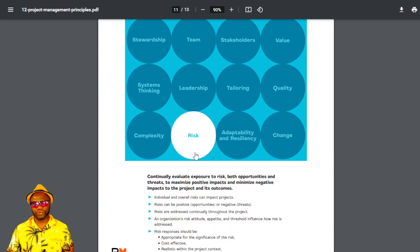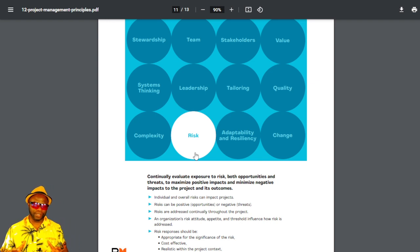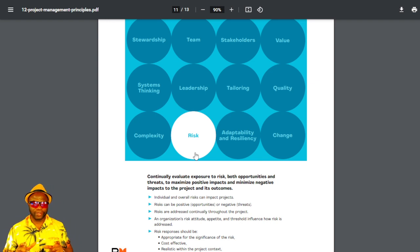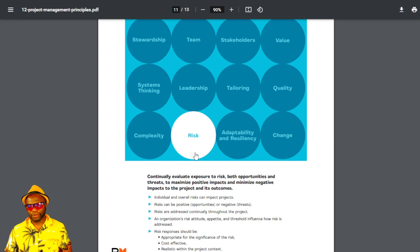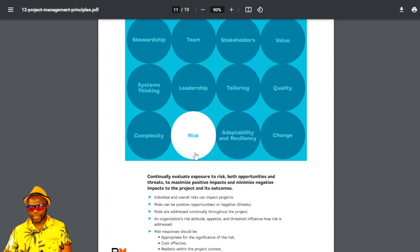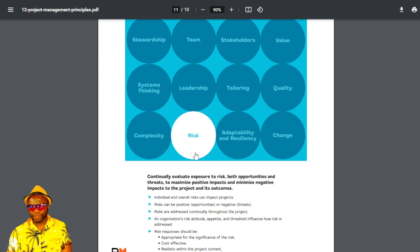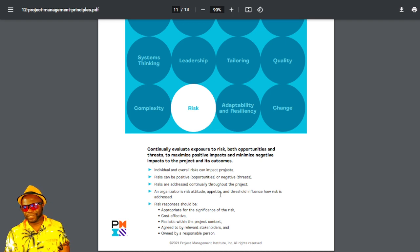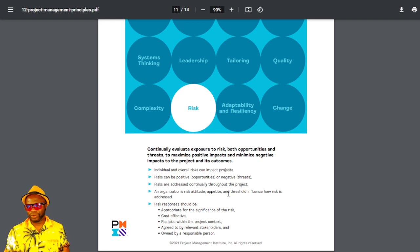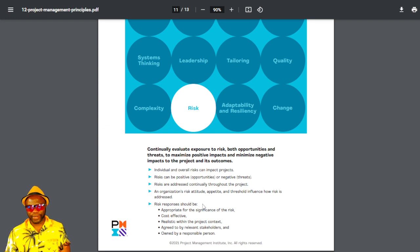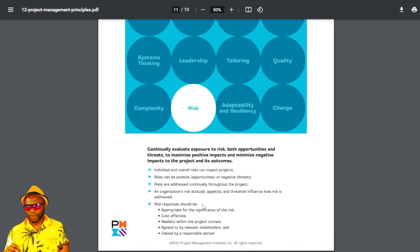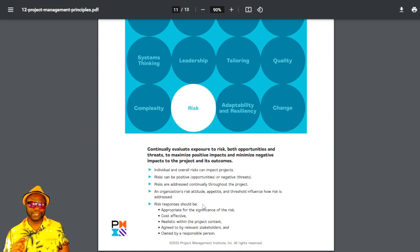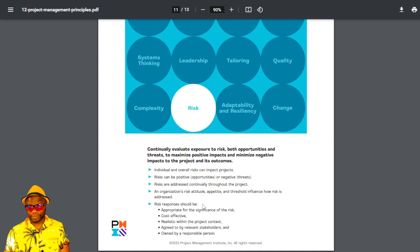The next one is risk. We already know what risk is. Risk is an uncertain event that could impact your project positively or negatively. And all it's saying is be aware of risks. Positive risks, opportunities, negative risk, threats, assess them all throughout the project. An organization's risk attitude, appetite, and threshold influence how risk is addressed. Risk responses should be appropriate for the significance of the risk, cost-effective, realistic, agreed, and owned. What they're saying, in essence, is choose the best mousetrap for that risk.